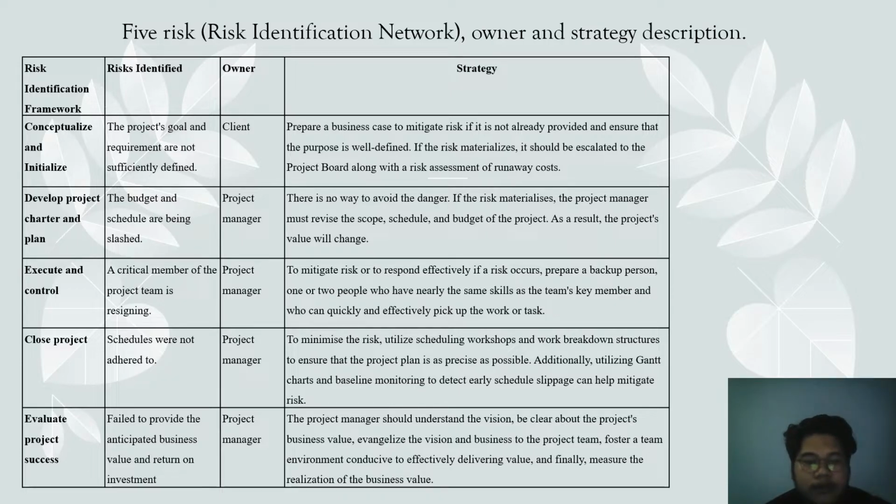Next is close project. The risk identified is schedules were not adhered to. The owner of the risk is the project manager. The strategy is to minimize the risk, utilize scheduling workshop and work breakdown structure to ensure that the project plan is as precise as possible. Additionally, utilizing Gantt chart and baseline monitoring to detect early schedule slippage and help mitigate risk.